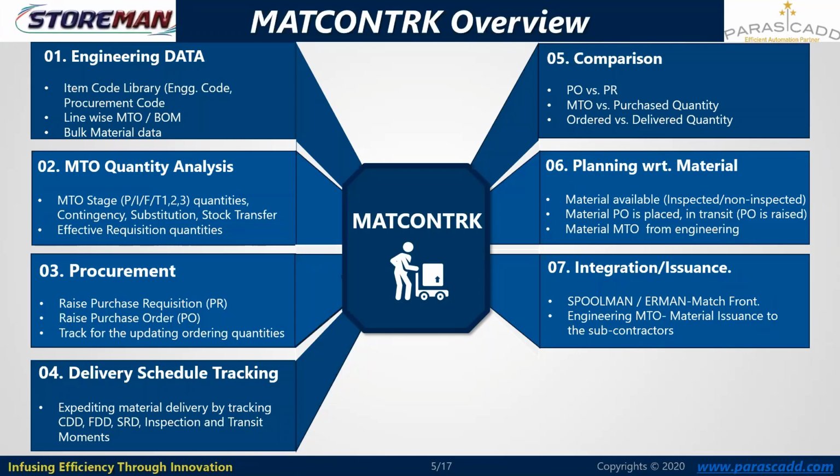So spool management and erection management is also performing the further material analysis procedures with respect to the issued job card to the fabricators and erection contractors, and with respect to the available work front, assigned work front with respect to the priorities. Now priorities can be assigned to the isometric lines or the spools, as well as to the areas like the units or the complexes where this work resides.